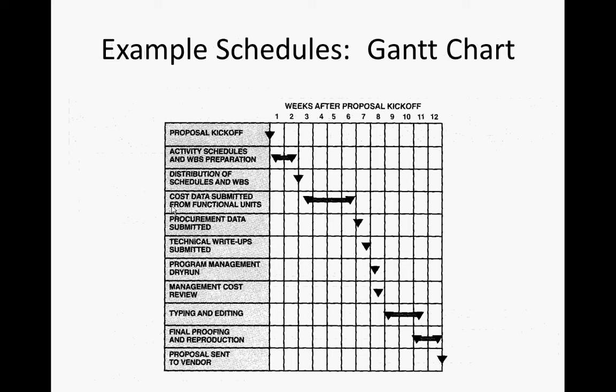It's true that in Microsoft Project and Primavera Project Planner, you can draw lines between these that will essentially characterize dependencies. But classically, if you look back, many decades, they have not depicted dependencies. In their pure form, they don't. That's a hybrid representation. I know because I've worked with those project planners before, and you can augment them with dependency information, but in their pure form, Gantt charts do not depict dependency.